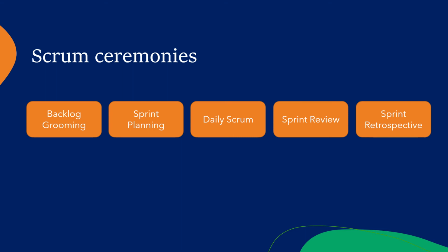Sprint planning is a time-boxed working session that will last for 1 hour for every week of a sprint. In this sprint planning, usually the team agrees to complete a set of product backlog items. The daily scrum happens on weekdays, every day for 15 minutes, to ensure the team reduces complexity, inspects progress towards the sprint goal, adjusts upcoming planned work, and discusses the impediments.